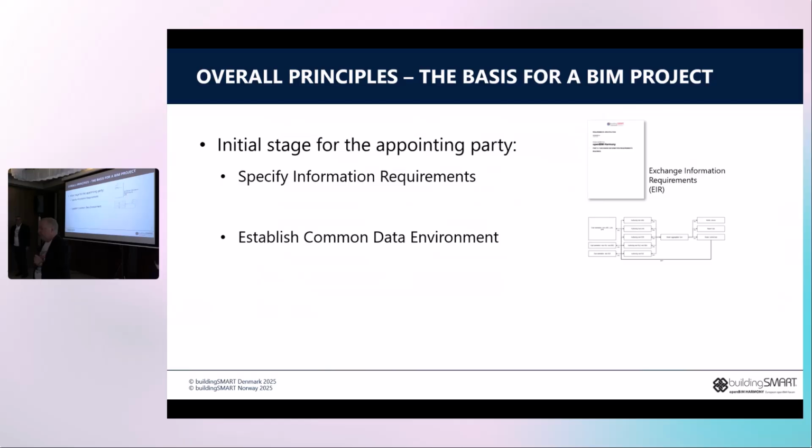Another thing is that they also have a responsibility to establish the accommodating environment. This is typically also something they will ask someone in the delivery team to do, which they still can, but they should specify the functionalities, user rights, data security and so on, and make a specific agreement with whoever is providing this.